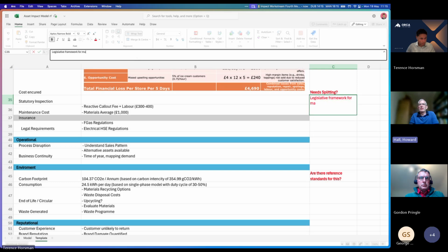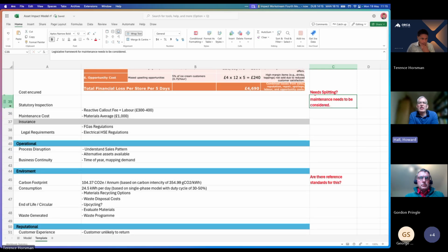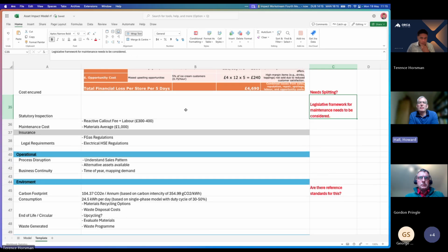So actually, you could be at risk on the basis of using something that hasn't been maintained or inspected. The classic one is lifts. You install a lift at Cat A stage, but you don't get around to using it until the Cat B fit out has been done. But that can be two to three years hence, in which case you've then got an uninspected lift that you have to start fresh with. Yeah.